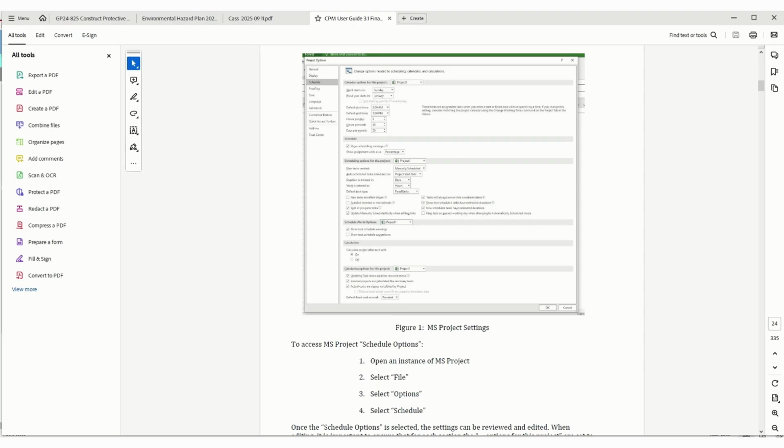After we get into monitoring a project, we'll start going into how we get the project started and how this percentage comes about. But right now we're just concentrating on creating this cache sheet. So after you see we put this data in here, now it tells us an estimated man hour, estimated man day, estimated duration, and this is based off of no crew or resource right now. And then percent complete and expended man days.